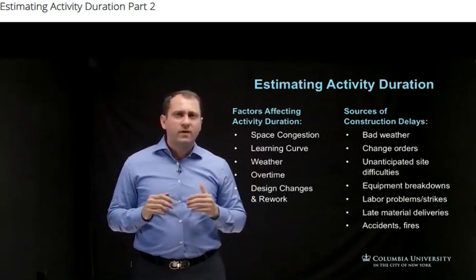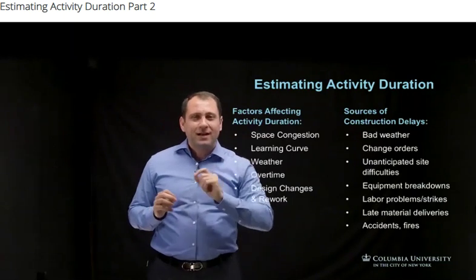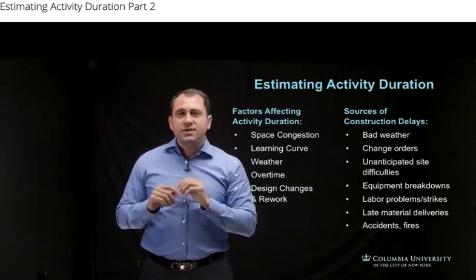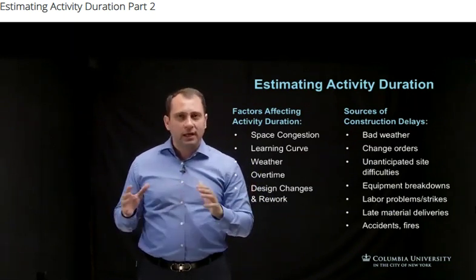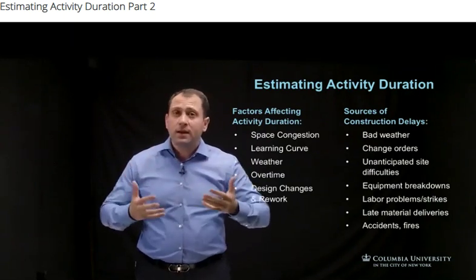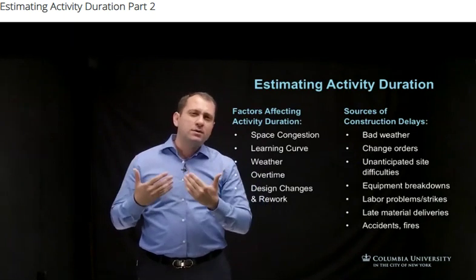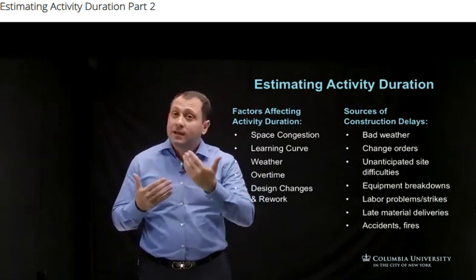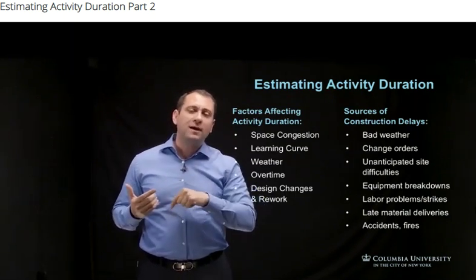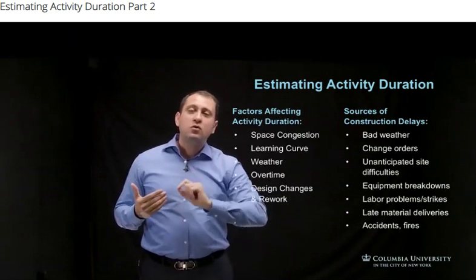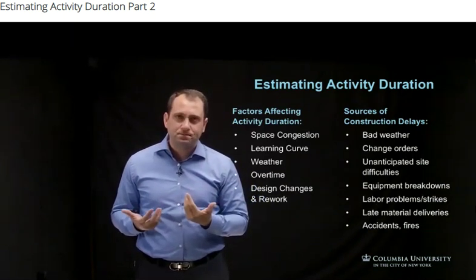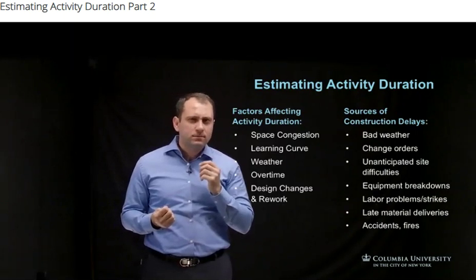Another point is overtime, and this is tricky because overtime is not usually a good thing. Much research and many industry personnel showed that extended work days or weeks exceeding the standard 8-hour work day or 40-hour work week actually lower work output and efficiency through physical fatigue and poor mental attitude. So something to consider here.